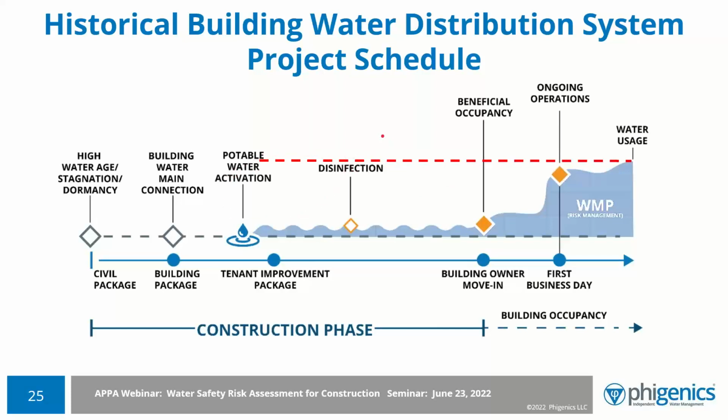The specifications should be, but may or may not call for disinfection procedures, and often the specifications don't have a date associated with it. So they just go check. They just do it whenever they feel the plumbing person and contractor or whoever they're going to have do it comes out, and it's just a checkbox for them. It has nothing to do with a schedule and time.